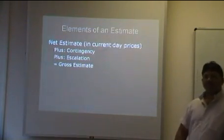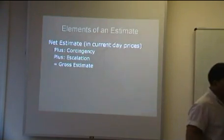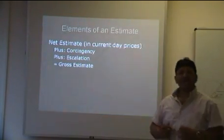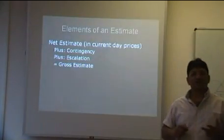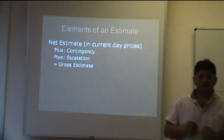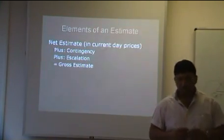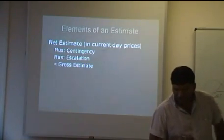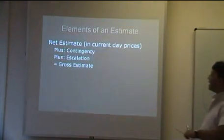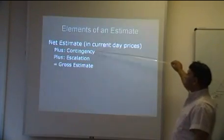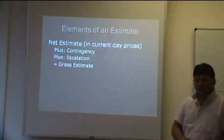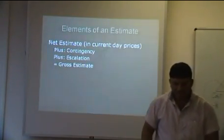Elements of an estimate. So what does an estimate consist of? If you look at the presentation, your net estimate in current day prices—it can be dollars, it can be euros, it can be yen, it can be pound, it can be rand, whatever currency value you've got. The net estimate is made up of the contingency and the escalation, which will then give you your gross estimate. So in essence, what we basically say...